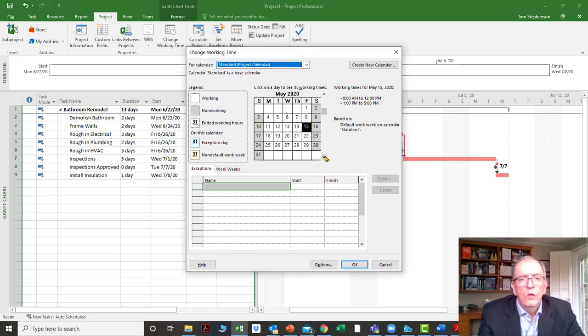It gets a little bit tricky to get used to this, but in the calendar view, you can adjust your calendar. What you really want in scheduling software is to have all of your non-working days put in at the start of a project. For construction companies, or any project-based company, even in IT where you do nothing but projects, a good thing would be to start out with a template file where you put in all of your standard holidays and days off that your company has.